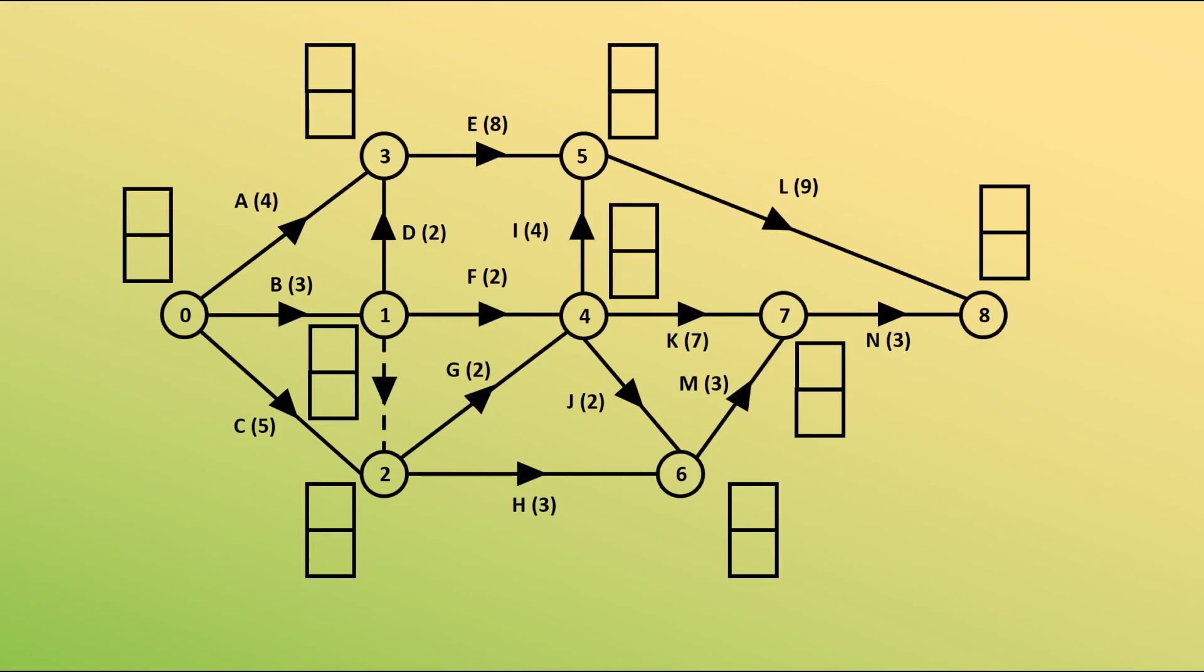In this diagram I've represented the activities using these edges. The arrows show which direction the activity proceeds in. The nodes or vertices are representing the events, moments in time when activities that feed into that moment have been completed. In each of the boxes next to the nodes we are going to be representing the earliest time we can be at that event and the latest time we can be at that event.